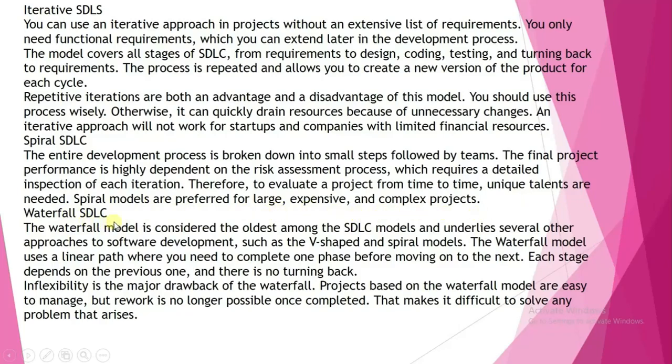So, waterfall SDLC. The waterfall model is considered the oldest among the SDLC models and underlies several other approaches to software development, such as V-shaped and spiral models. The waterfall model uses a linear path where you need to complete one phase before moving to the next. Each stage depends on the previous one and there is no turning back.